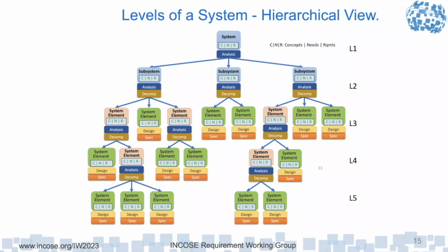So this is required to have documentation, operating procedures, things like that, but that should not be in the system requirement specifications. It's a deliverable or it's a requirement on someone else to prepare that documentation in accordance with a certain standard, someone else to verify it. So it's a completely different set of entities. It's not the system that does that, verifies it, or any of that.